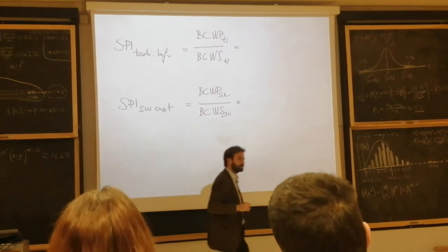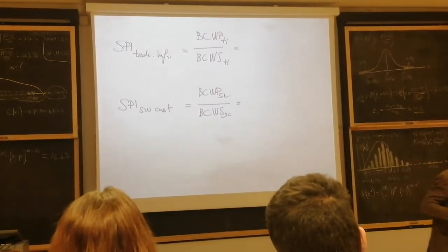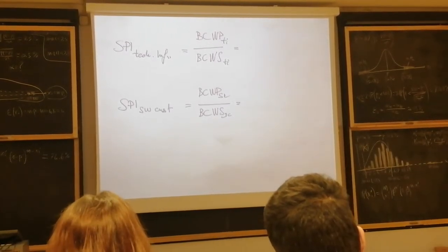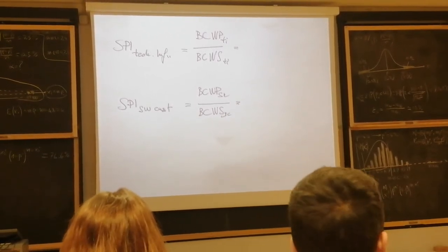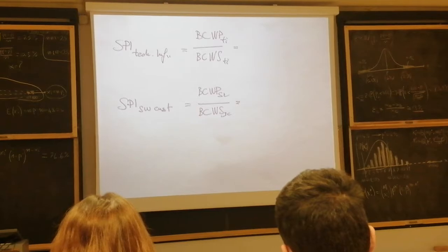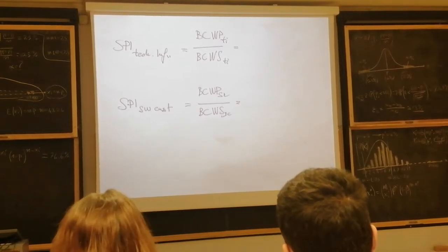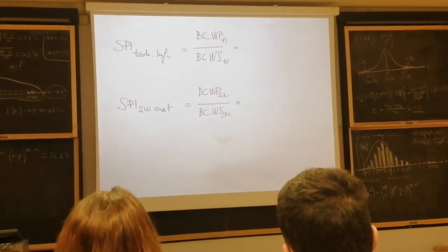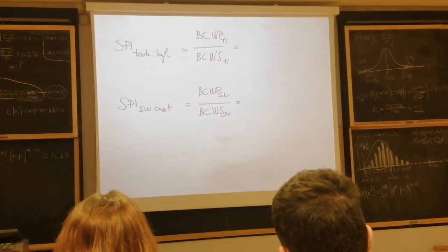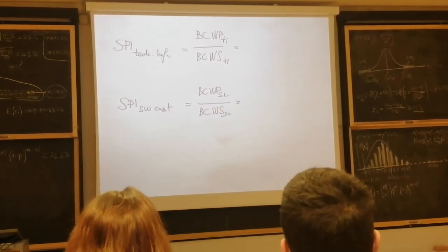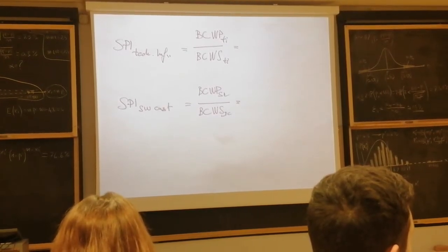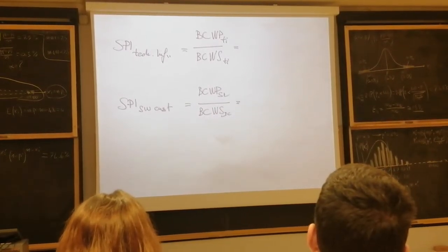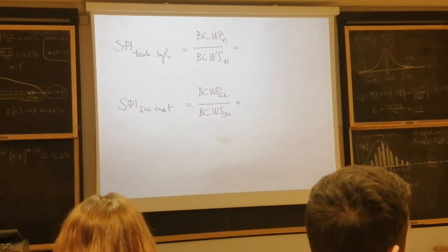Yes, please. I don't understand why in this case the planned and the performance of the actual. Oh, it's by definition. The definition of schedule index in the literature and the PMBOK is defined as earned value, which is our reference baseline, and we compare it to the denominator, actual or budget, to get the cost performance or the schedule performance.